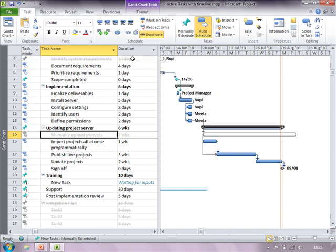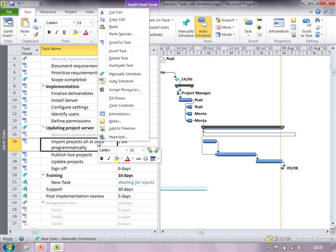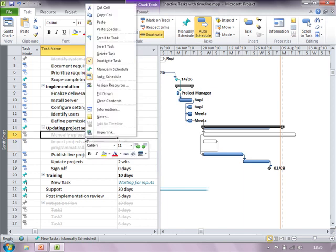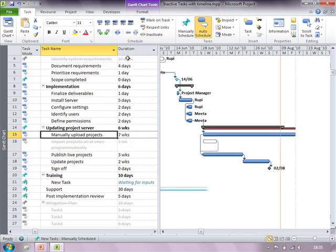For some reason if my developer is not available or there are some budget constraints, I can go back to the other method where I deactivate or inactivate the automatic updating of projects and activate the manual update. So now managing the right method of doing a particular task is easy. I can have multiple ways written in my project schedule and I can inactivate or activate tasks within a click.